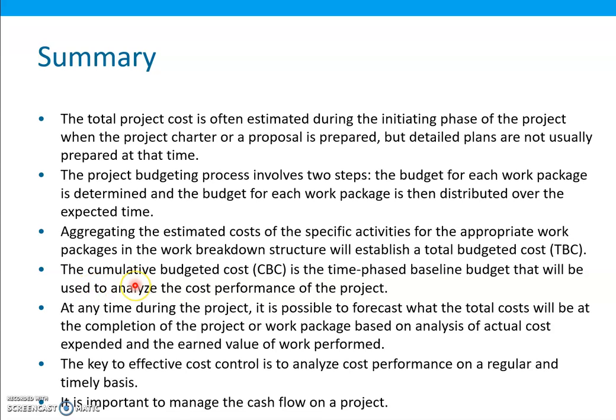The cumulative budgeted cost, CBC, is the time-phased baseline budget that will be used to analyze the cost performance of the project.